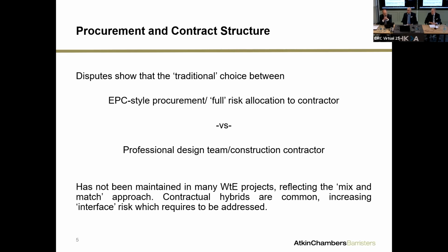That's not really being followed, and particularly not in WTE scenarios. It reflects this mix and match approach, buying or specifying proprietary components and building the plant that way. Contractual hybrids are common, and unless they're thought through properly, they increase the interface risk in contracting, procurement, and design.